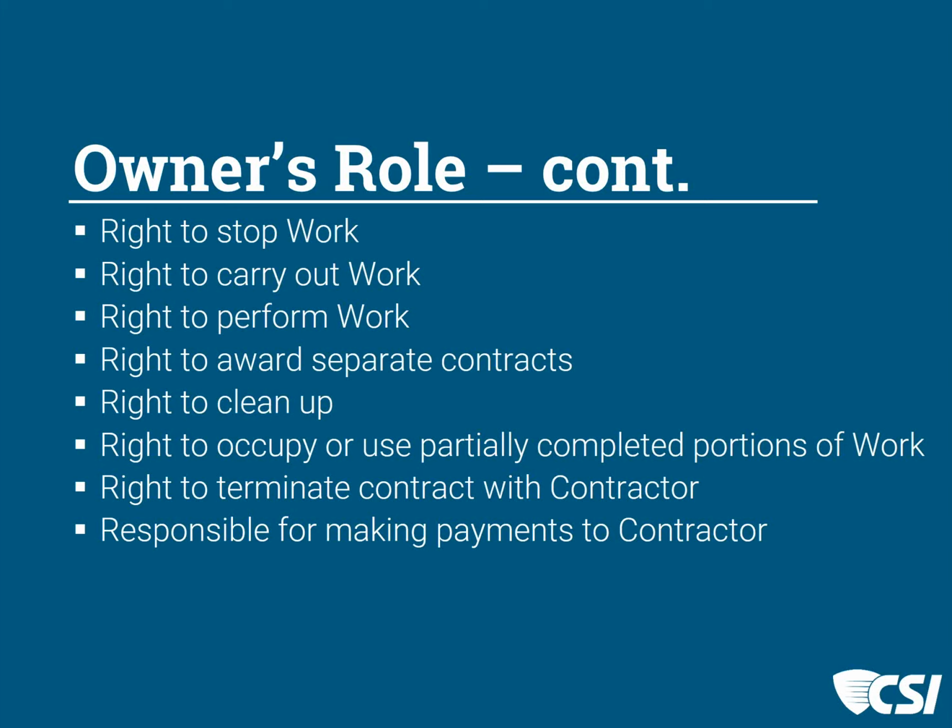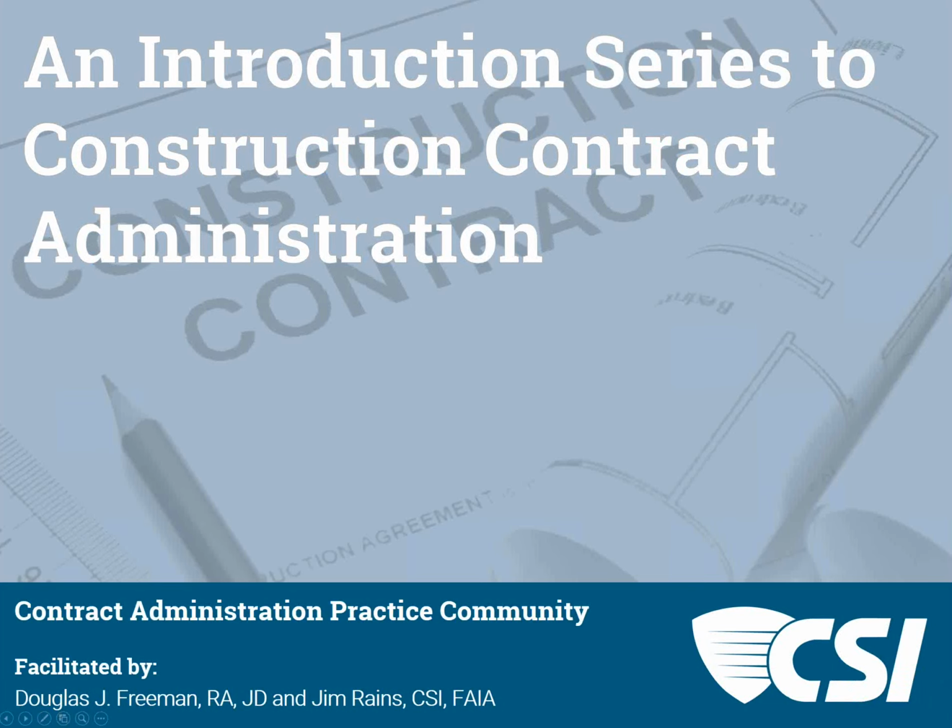But you have to do that. You have to show in the bid form, and you have to call out electrical, mechanical, site. You can go as deep into that as you want to request those subcontractors. And then include the verbiage that you reserve the right to reject their bid.